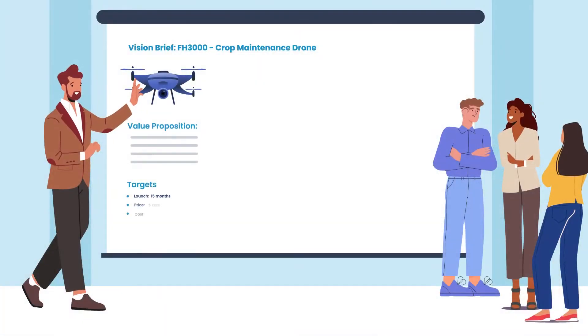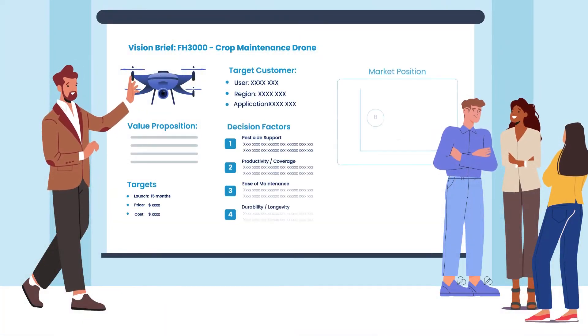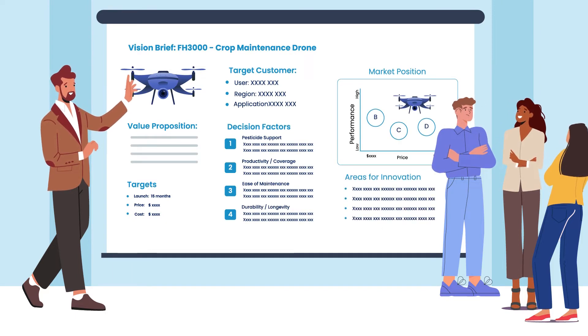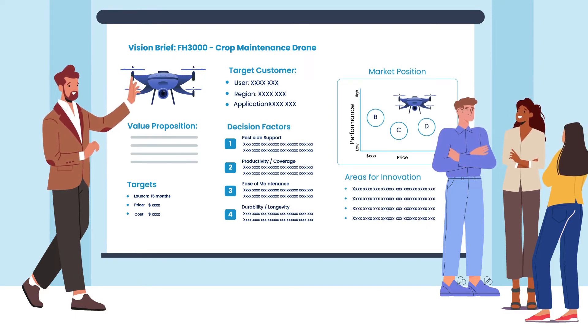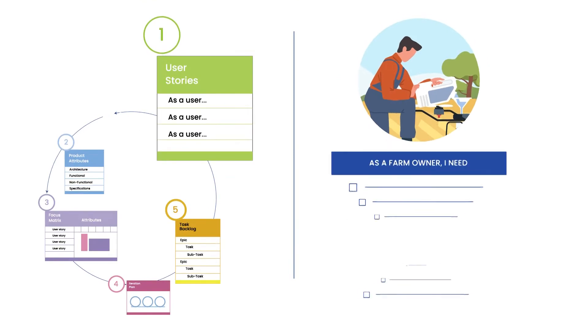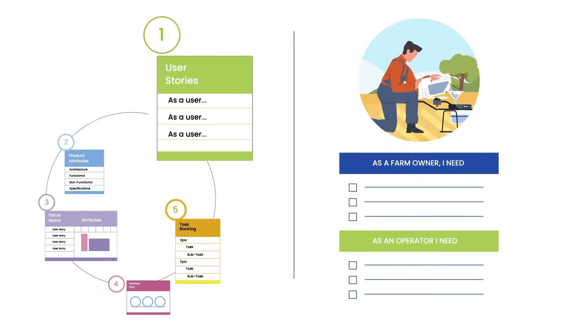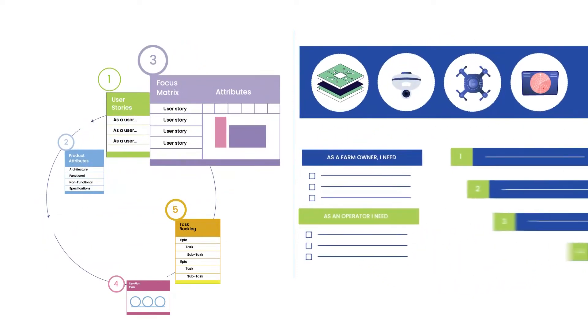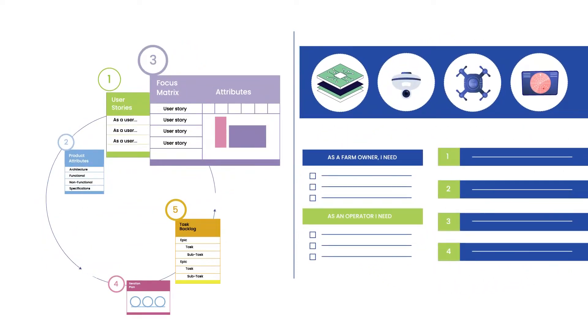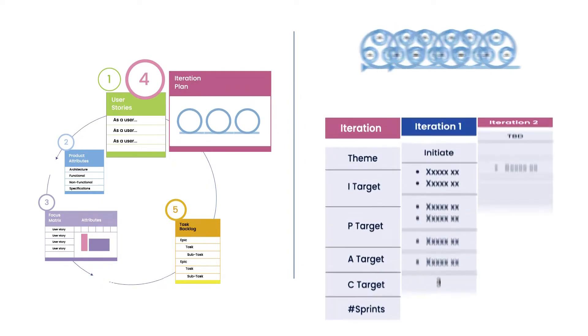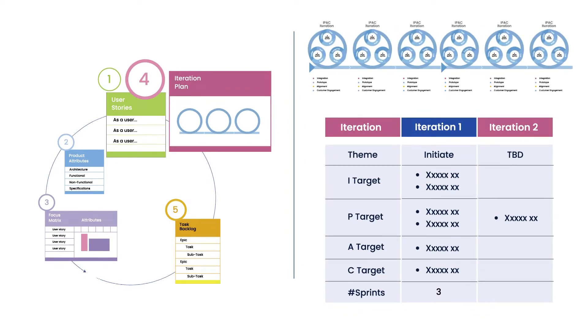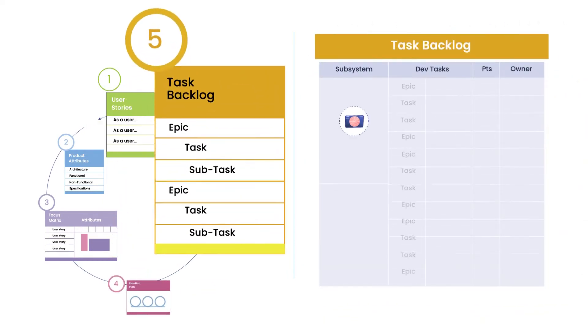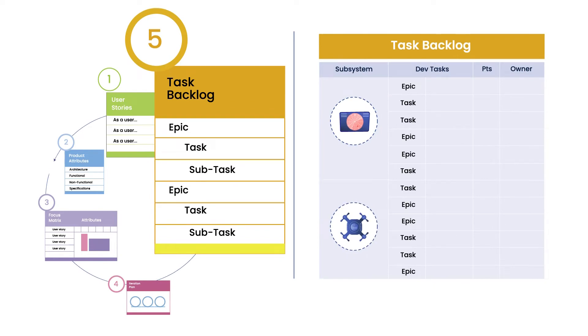Starting with an agile vision brief, the MAD on-ramp enables collaborative activities to quickly initiate a project in the right direction. In a matter of days or weeks, the team works through user stories, develops a common understanding of potential product attributes, identifies key areas of risk and innovation needs, and identifies critical early milestones with an initial iteration plan. At the end of the on-ramp, the team has the start of a focused backlog ready to execute.